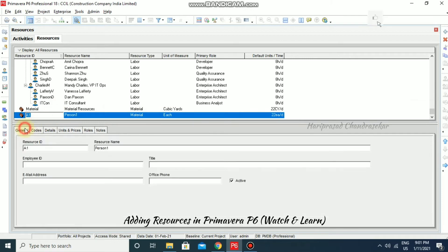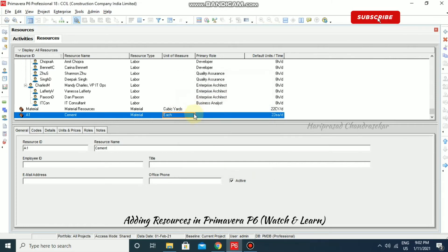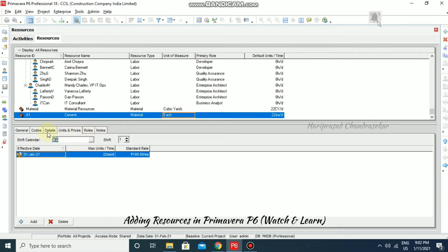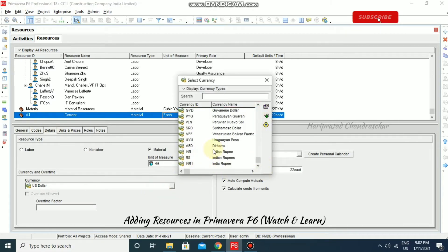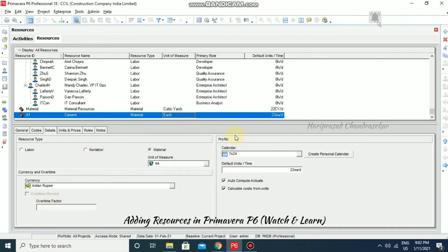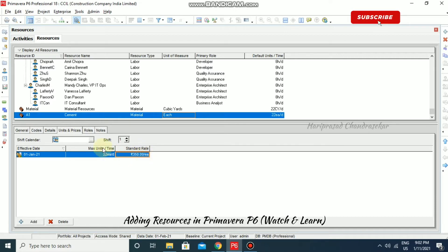Now these things we can change from the Details tab. For example, I'm going to name this one 'Cement', set it as Material, and add 'each — cement bags'. If you want to modify any value you can go to Details, choose the currency, and under Units and Prices you can put the standard rate — for example, 350 per bag. For maximum units per time, 22 bags per day means 22 each per day. Based on this, resource leveling will happen.